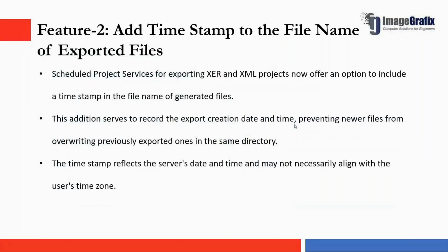we can add timestamp to the file name of exported file. So this option is a very useful option. Whenever we export some particular project, it will export along with time. The timestamp option is included in this. By using the schedule service here, we can schedule the project service for exporting the XCR and XML projects.